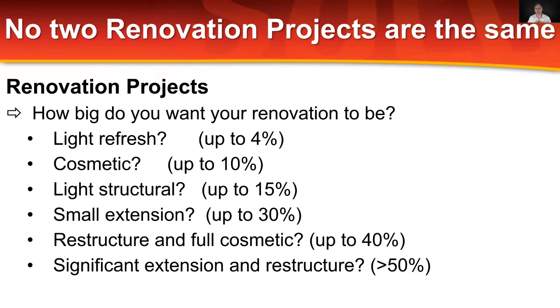That makes a significant difference in the number of offers that come your way, and in the number of applications to rent your property. So my encouragement is make street appeal good, and landscaping is one of the ways you can do that. So a light refresh, you're spending up to about 4% of the value of the property, which is staging, landscaping, painting.